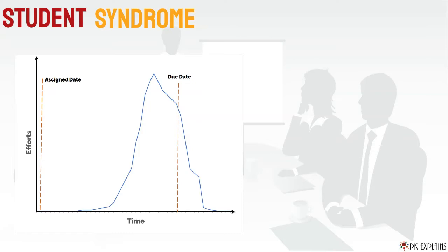Student syndrome was first introduced in the book, The Critical Chain. The hypothesis introduced in this book has been widely adopted in the industry in recent years. Students postpone their learning activities until the deadline, and project team members do the same regarding their project tasks, because they think they have enough time to do everything. As a result, they just waste time. This wasted time would prove useful if any unplanned event occurs or any uncertainty materializes.